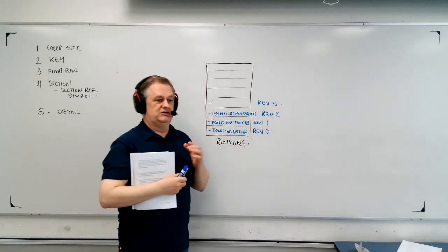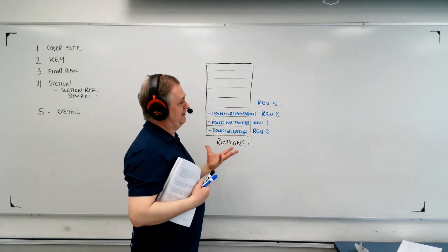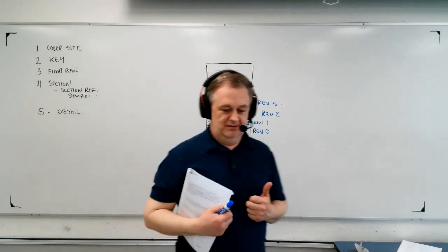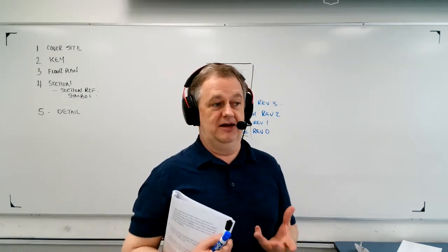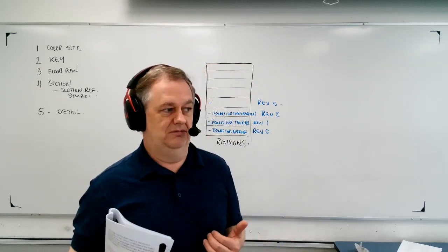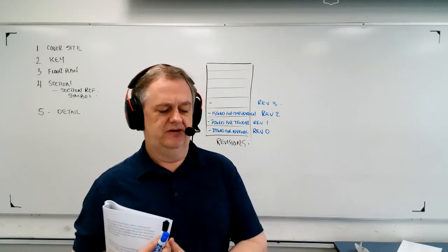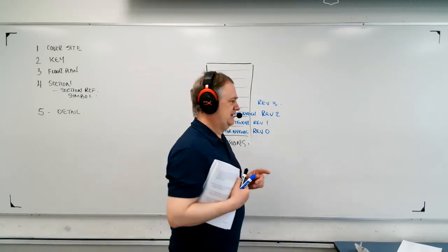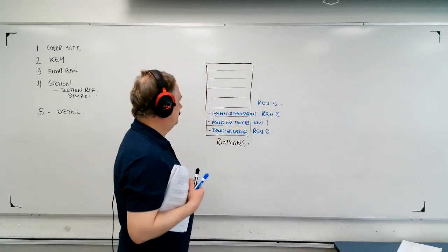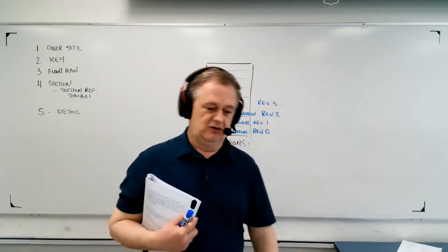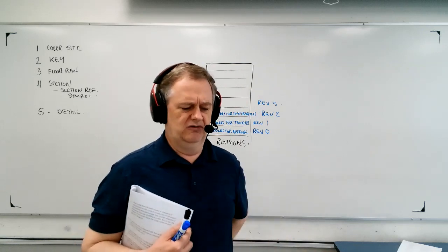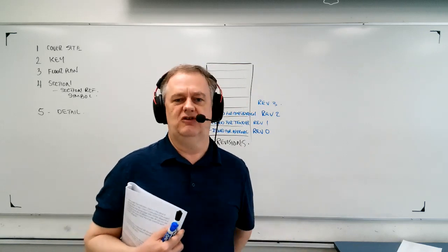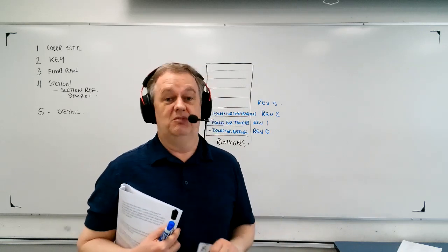Let's say that you call the architect and you say, I'm looking at this set of plans, and I see a problem. I see a real conflict, and I'm not sure how to move ahead with this because it looks like what we have to do, but there's something in the way, and this just isn't going to work. And so the architect will go, oh, I think we actually dealt with that. So I'm looking at revision 4, and it shows you doing this and this and this. And you go, revision 4? Oh, I'm looking at revision 3. Now, that might be your fault, or it might be the architect's fault for not getting the new set of drawings to you. But in any case, you're going to sort out pretty fast what the problem is.